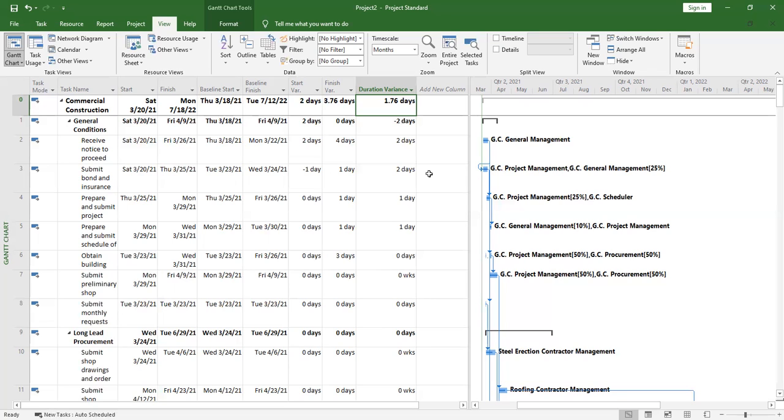It depends on the way things happen. We may schedule a project to start on Monday and finish by Friday. Those are 5 days. But what if the duration stays the same, but it starts on Wednesday? The finish is pushed by 2 days and also the start, but the duration has not been pushed.